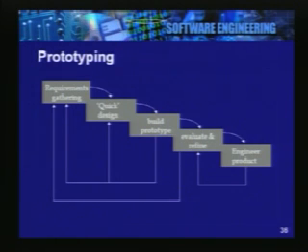While building the prototype, we may not care about doing too much documentation or look at the maintainability issues or even consider performance issues if they are not relevant. Idea is to do a proof of the problem by demonstrating the unknown or ununderstood issues. Then after we have built the prototype, we evaluate and refine, and if necessary we go back and repeat this whole cycle.